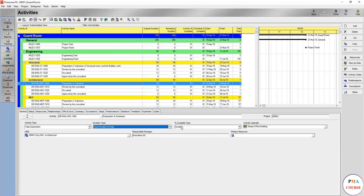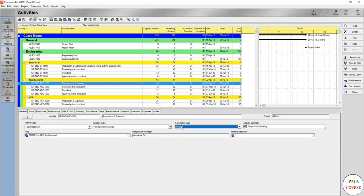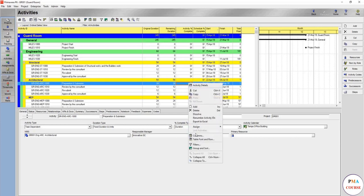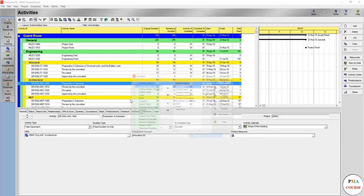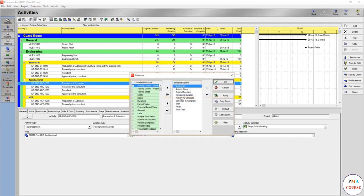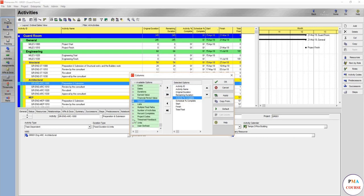Percent complete type is duration. So what does duration mean? Duration means here that if this activity during the update is 50%, if this activity is 50%, we are going to add a column for percent complete.